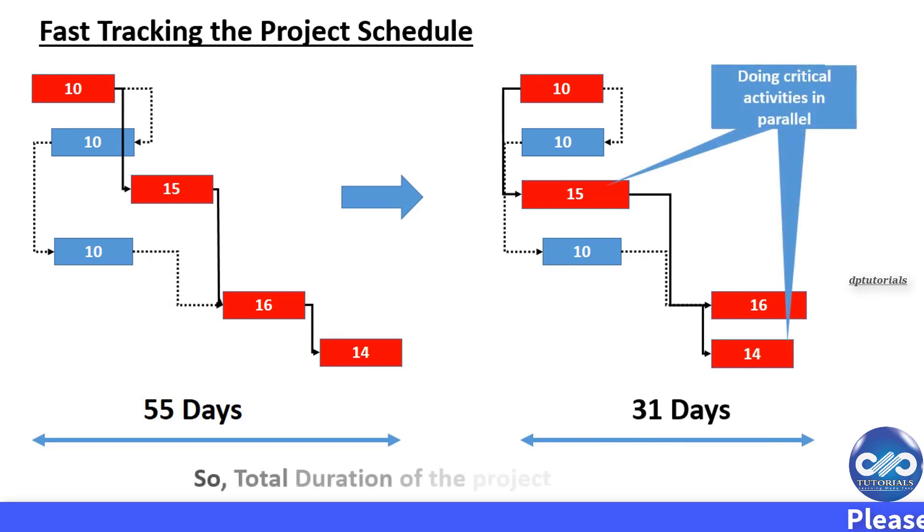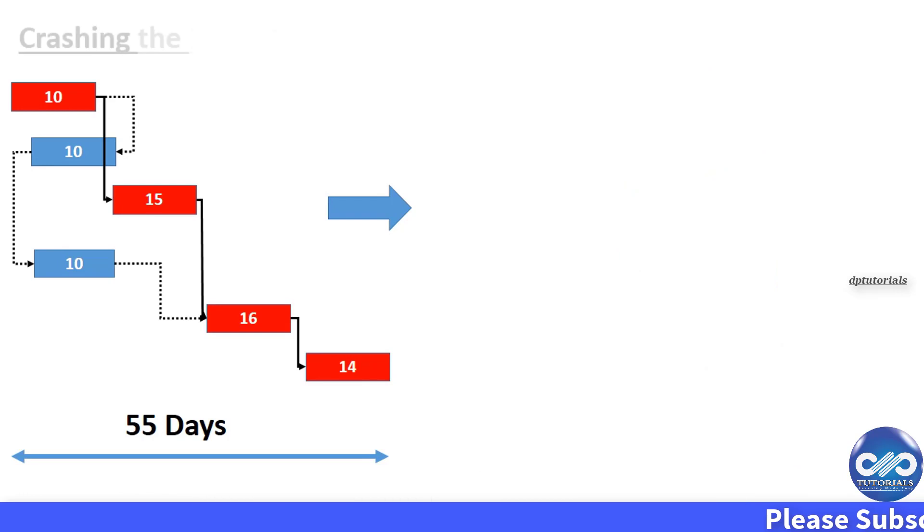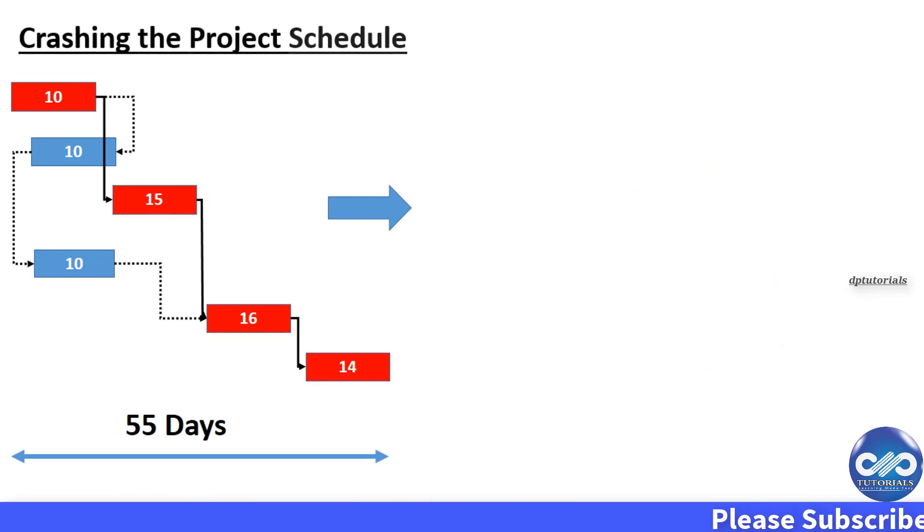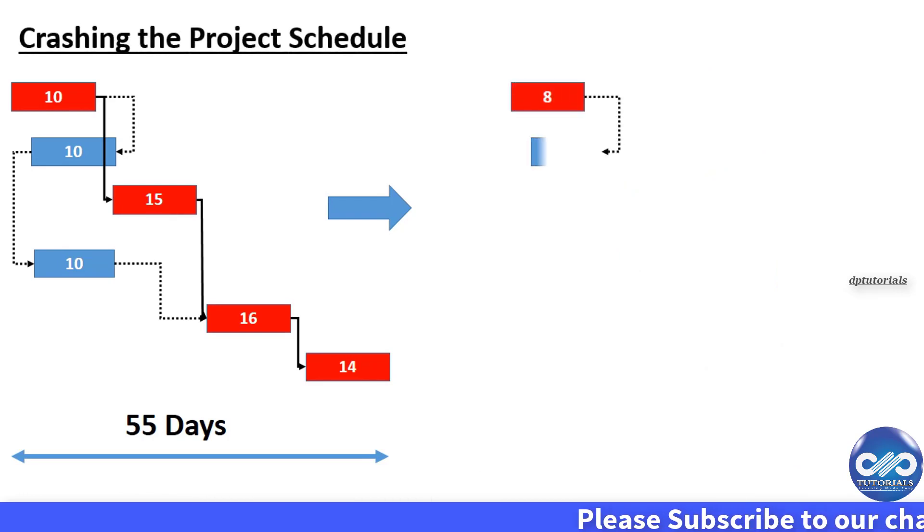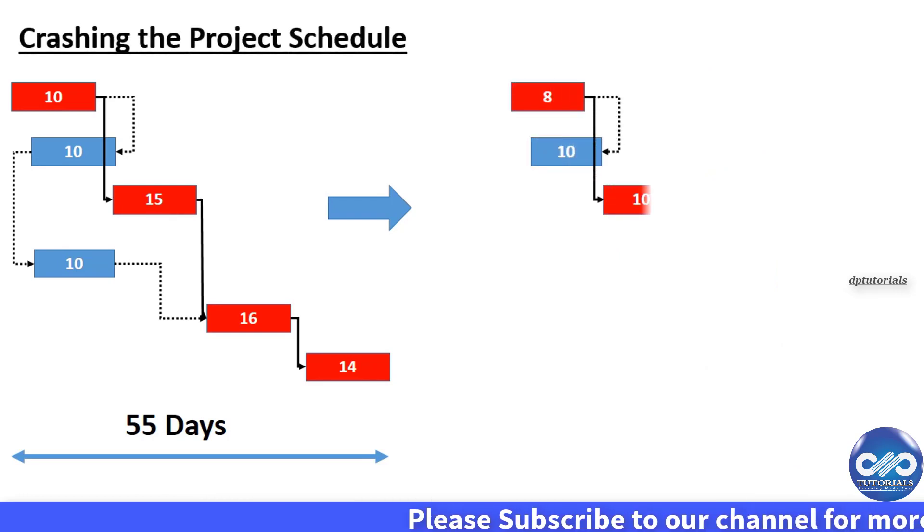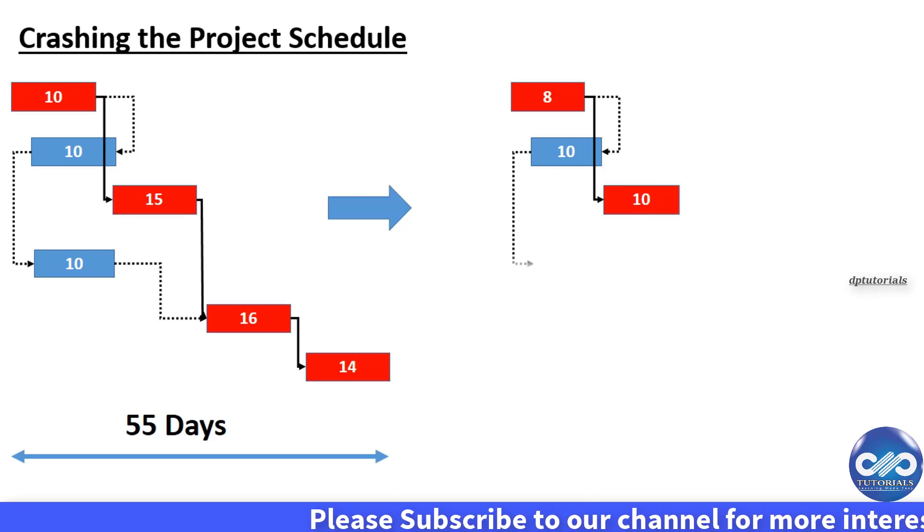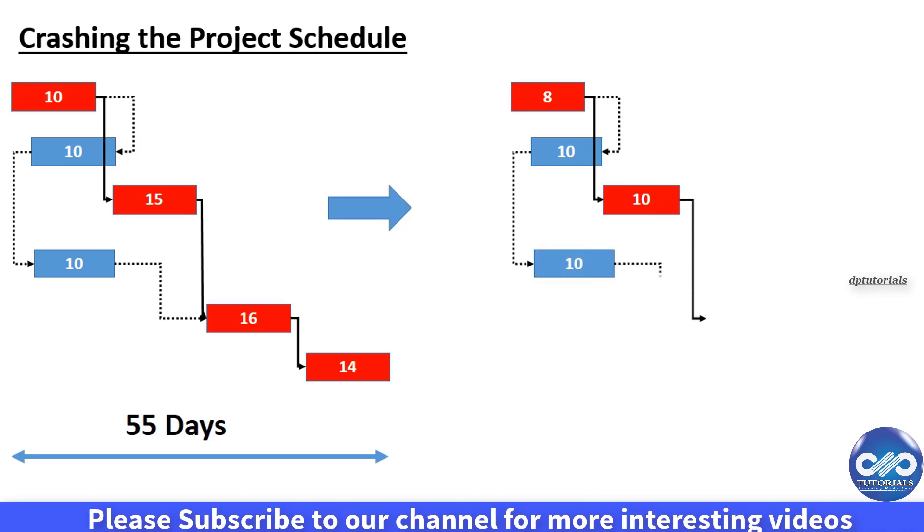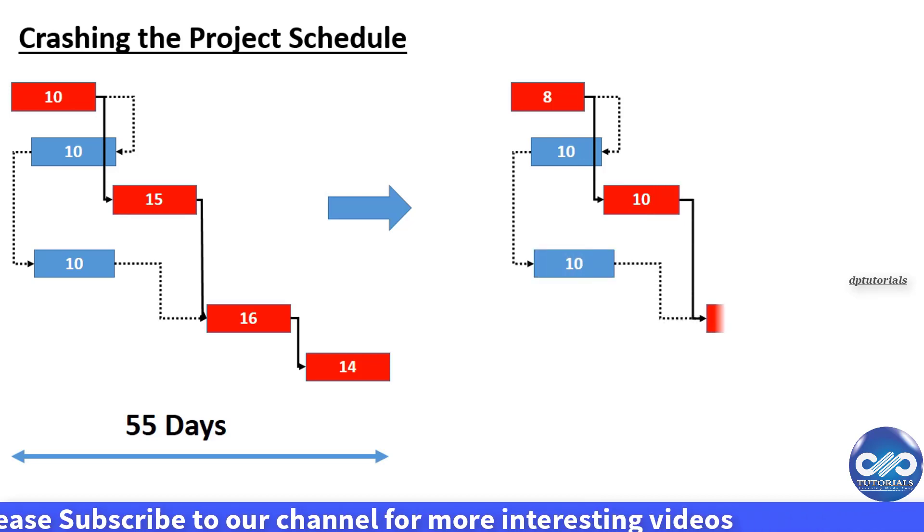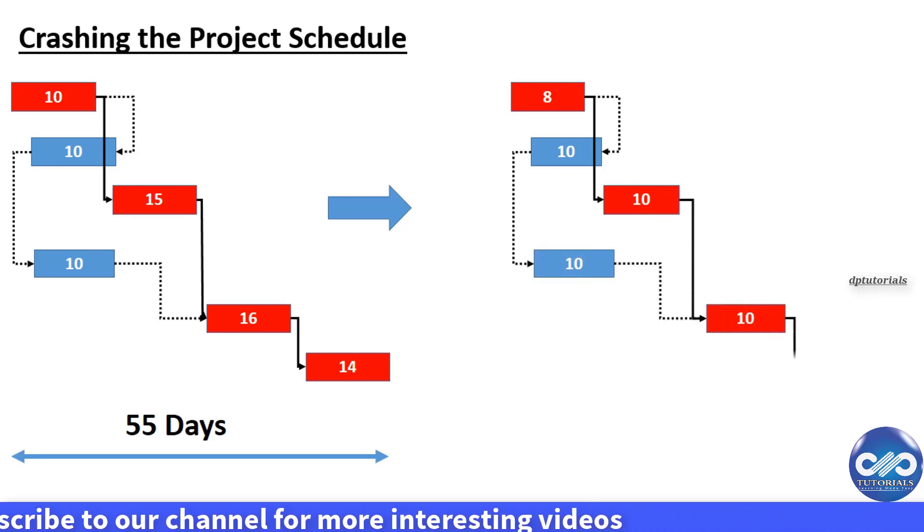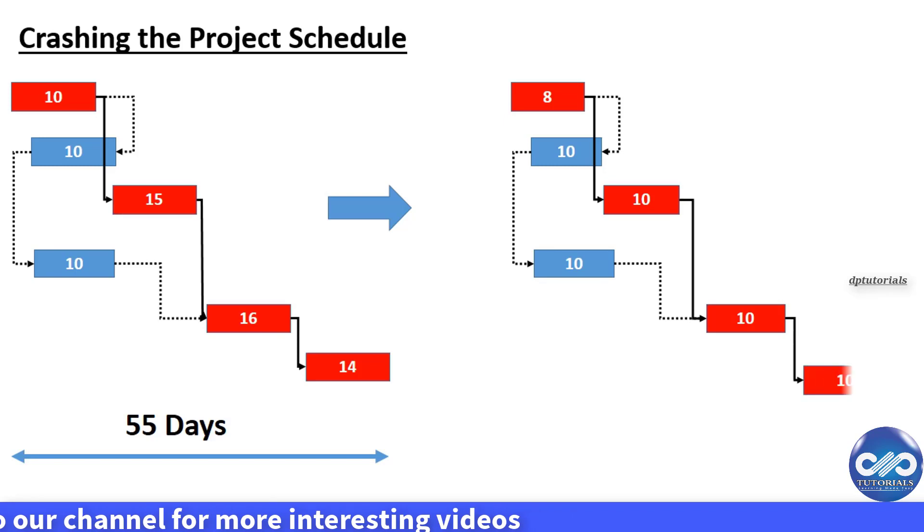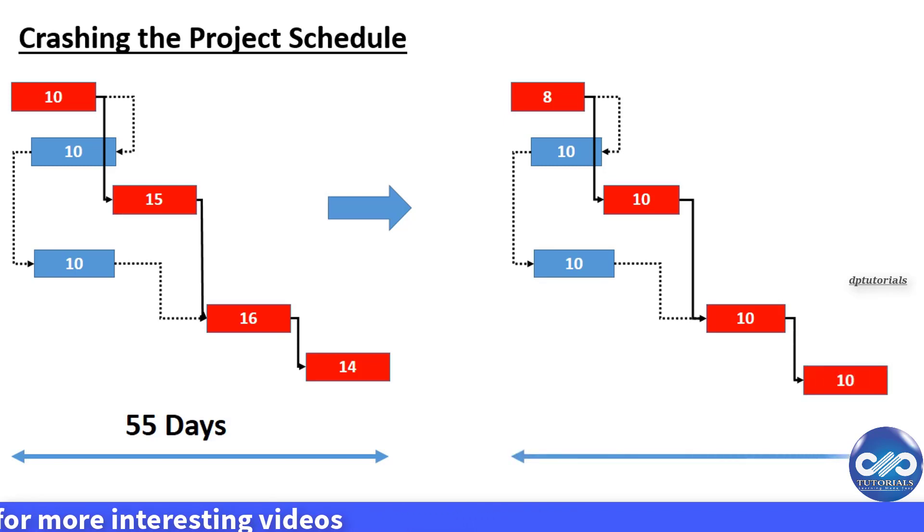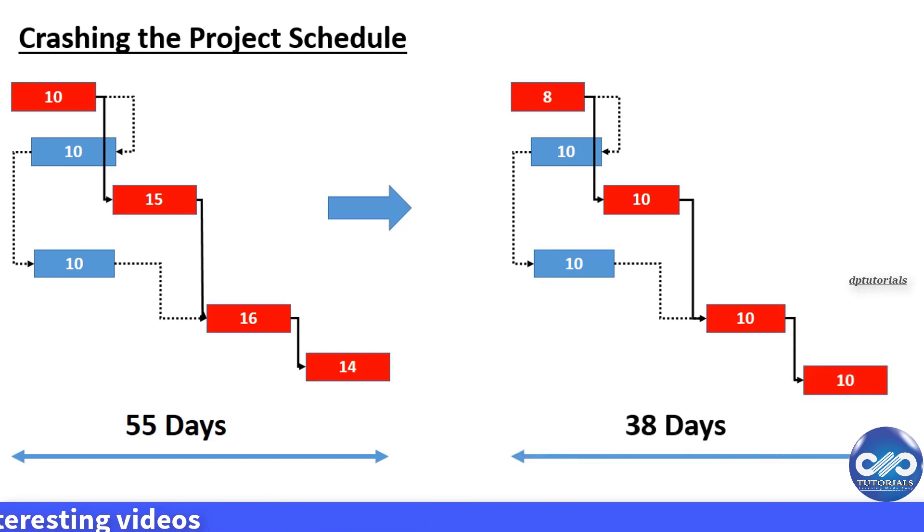Now let's see crashing. By increasing the resources allocated to critical activities, we can reduce the activity duration thereby reduce the project duration. This technique can't be applied to all the critical activities.